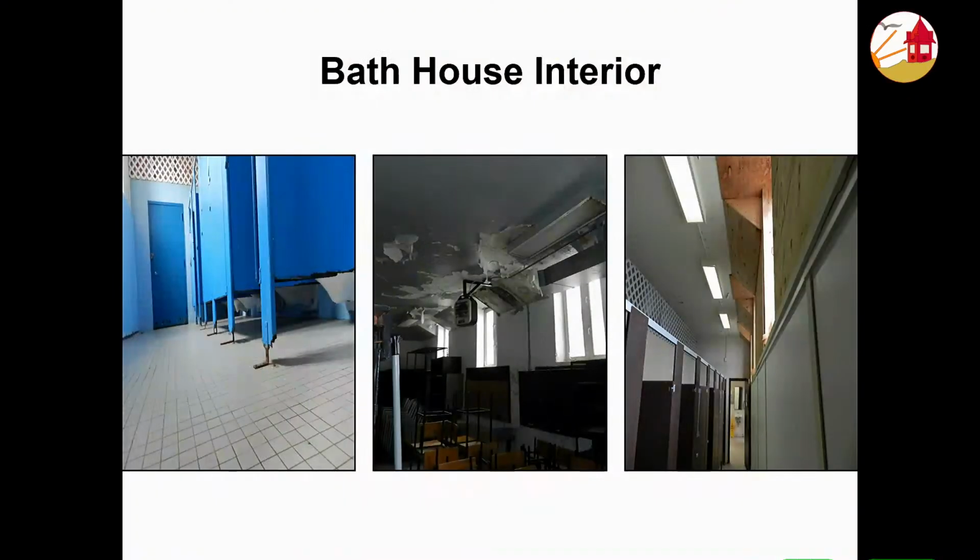Bathhouse interior, the project we've all been waiting for. We are close to putting this out to bid at this juncture. We're doing our final construction documents and writing of the specifications for this. Our estimation is probably 3 to 4 weeks before we're ready to push that button. We are waiting for final go-ahead, both from state parks and